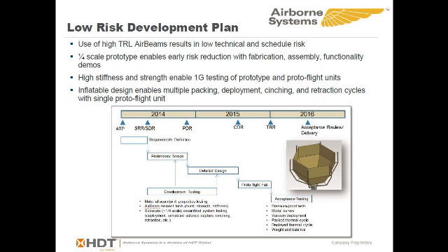And in our development plan, we proposed a quarter scale, could be a 1/5 scale to match up with the JPL system. But that could be fabricated very early in the development process and advise the critical design review, really substantially reducing the risk. So that could be used for packing, deployment test, simulated asteroid capture maneuvers and those kind of things very early.